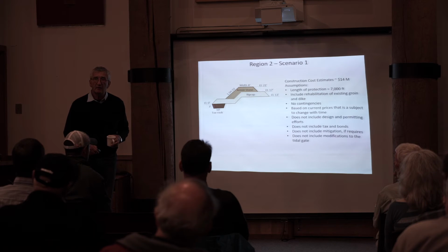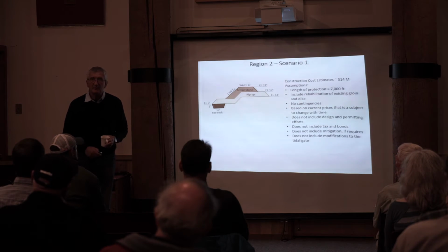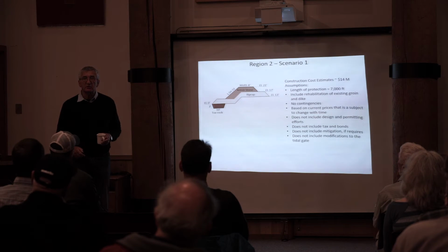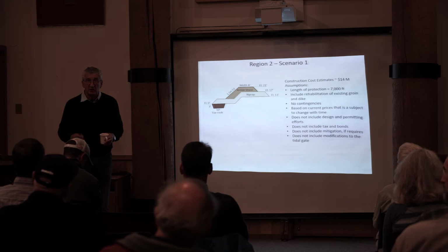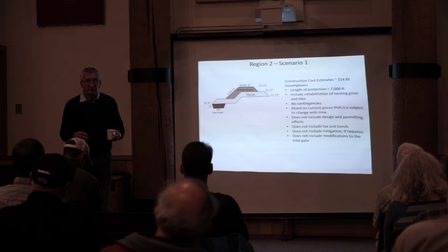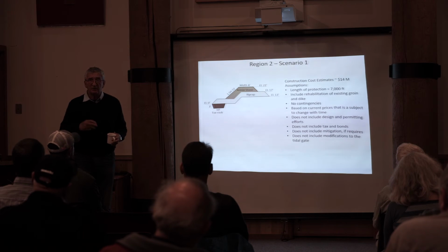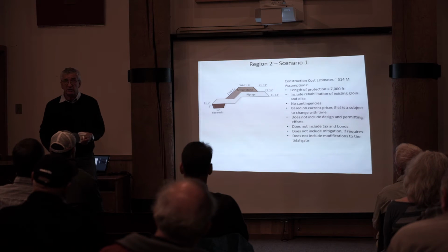Vladimir, when you say rehabilitation, what does that involve in the existing groin? Is that bringing it up above water, or underwater? It's just bringing it to the condition it was before. We know that it's deteriorated, it changed, and unfortunately we cannot estimate how much it changed and how much deteriorated, but we know it did. And because we have very little information, we cannot use it. Therefore, we put $5 million for rehabilitation of these structures, a little bit less than 30% of the original cost.